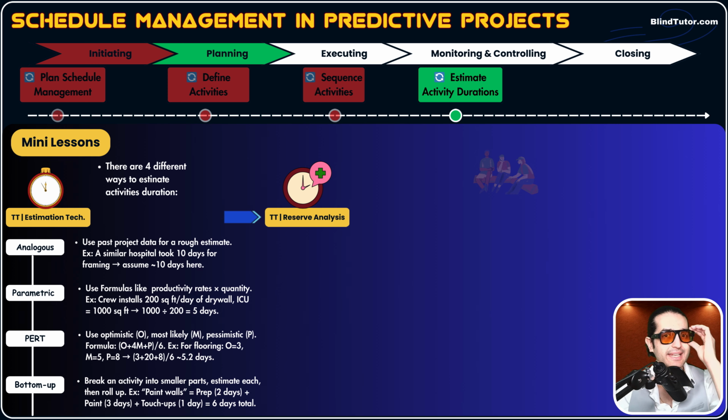risk register was an input to our process of estimate activity duration. Okay, why did we say risk register is an input? Because we said we need to consider risks when assigning durations for each activity. Why? For example, guys, we have a construction activity, okay, and we're gonna have severe and harsh weather. That construction activity, the actual work, could take 10 days, but considering that winter, like harsh winter, in harsh winter